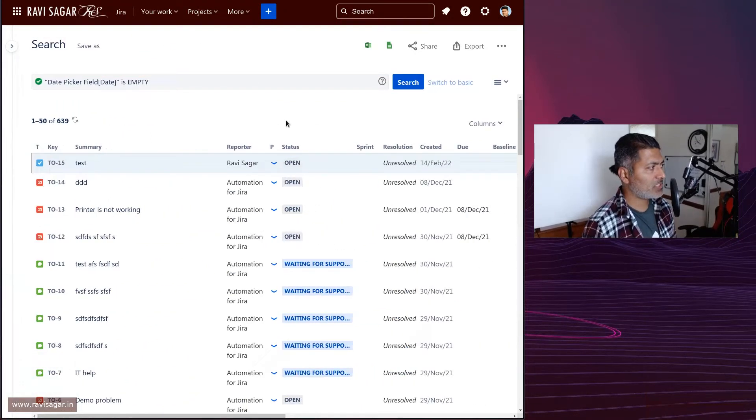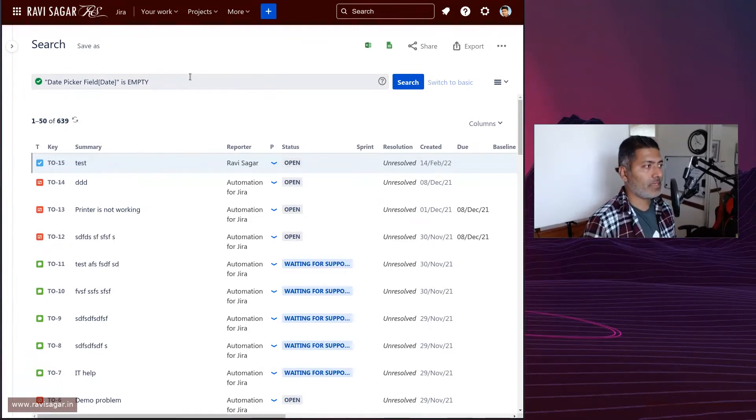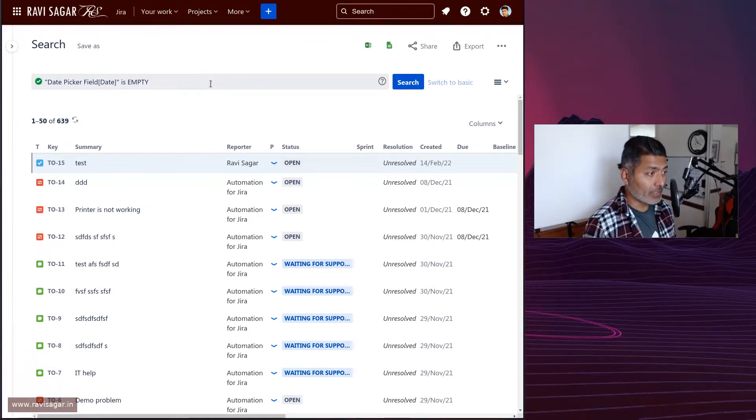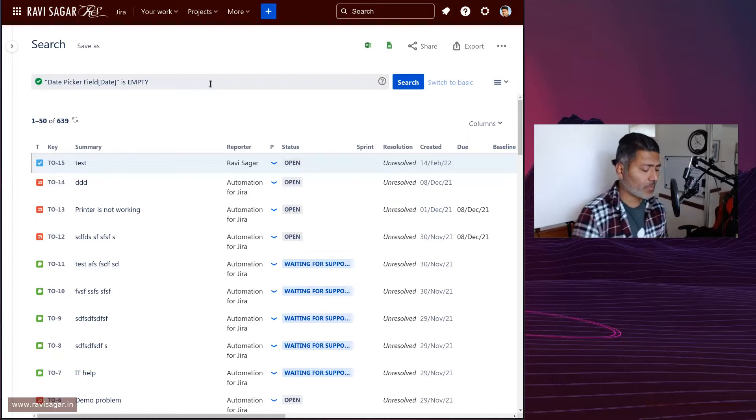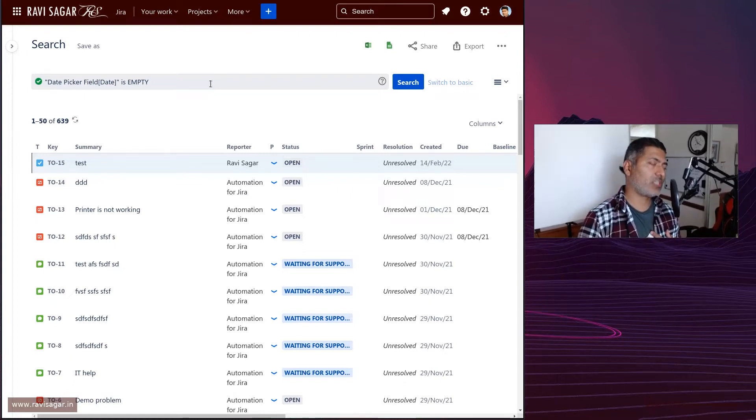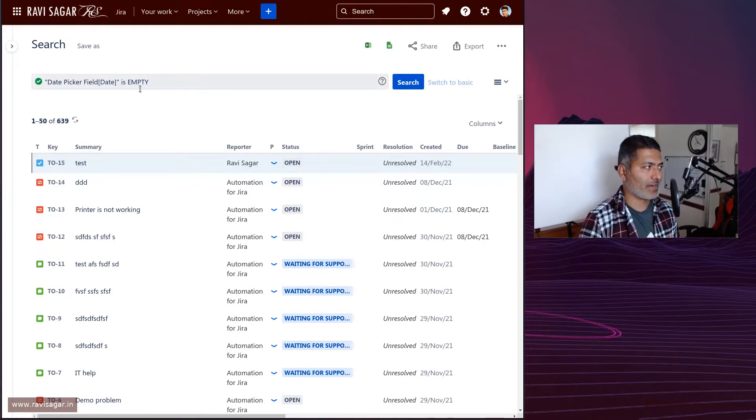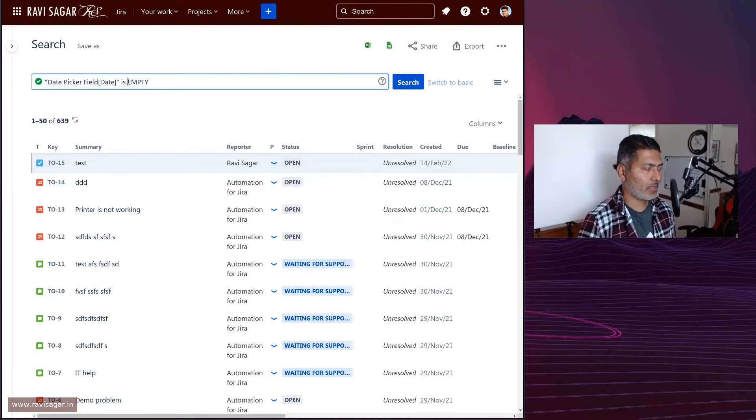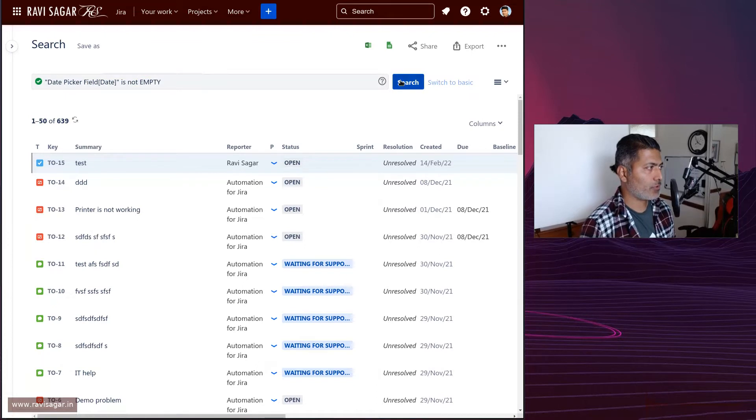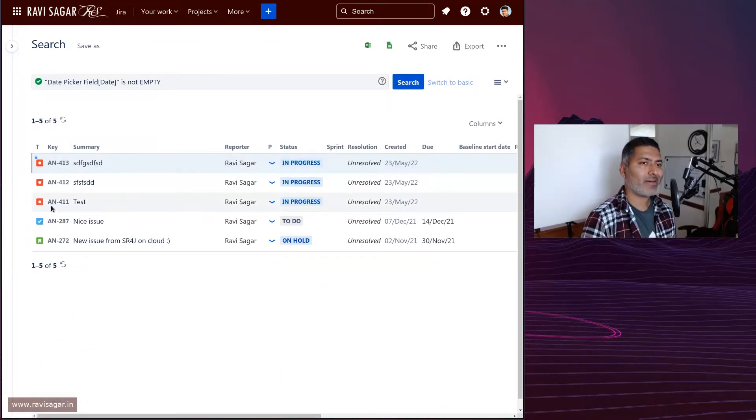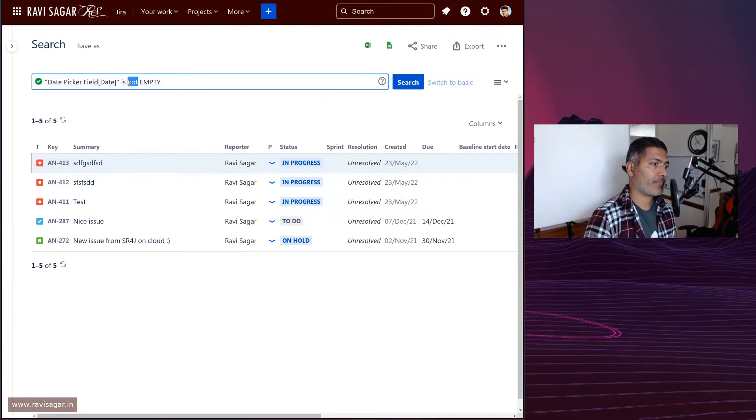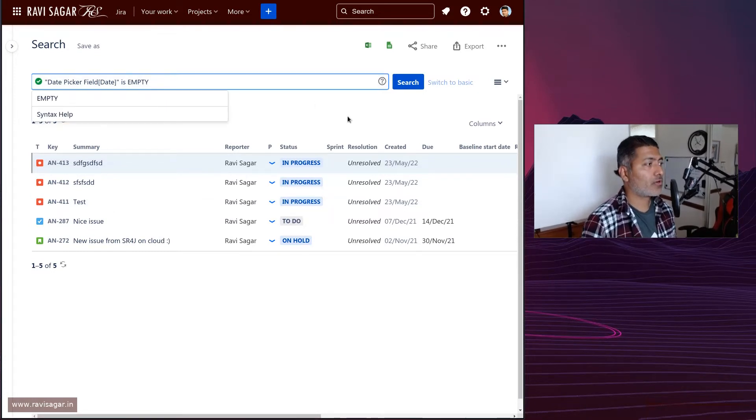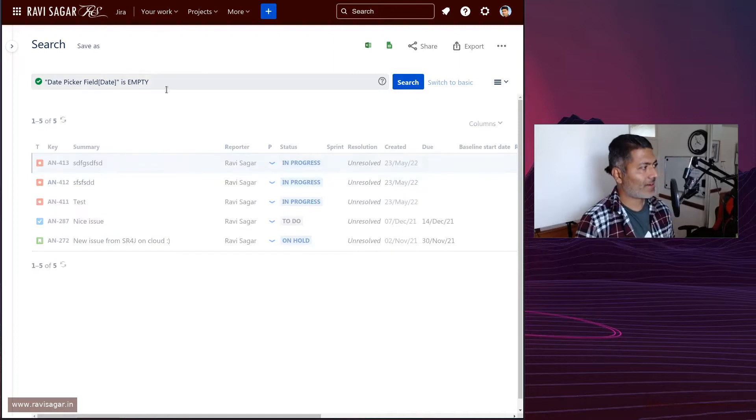A simple JQL like this: 'date picker field is empty' will return all the issues where this field is not filled in. Or you can do something like 'not empty'. If you do 'not empty', it will give you the issues where this particular field is definitely not empty, but we want to do the reverse.